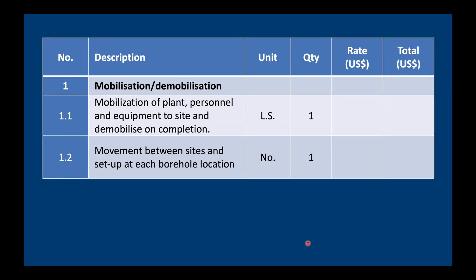Here's an example of a Bill of Quantities for the water well we discussed earlier. The columns are: a number, a description, unit, quantity, rate per unit, and total cost. In Bill number one we cover mobilization and demobilization. The first row covers all costs associated with coming to the site with all the equipment and personnel. It's paid as a lump sum and there's only one mobilization. We also have a separate line for setting up at the borehole location, in case we need to drill a second well.